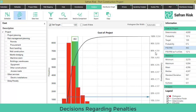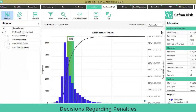Now shift to the schedule icon on the distribution graph. On the deterministic date of March 17th, 2028, there's only a 3% probability of making that target on time. In other words, there's a 97% probability that there will be some penalty on the project. The question now is: how much?